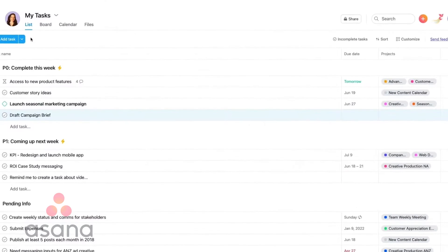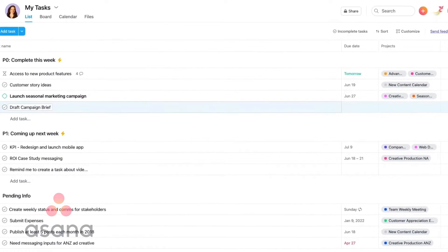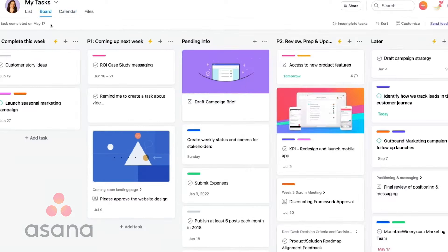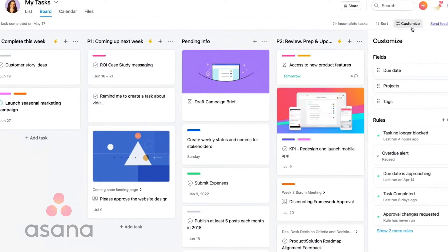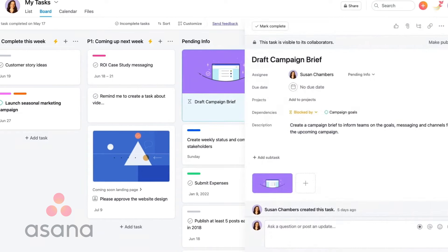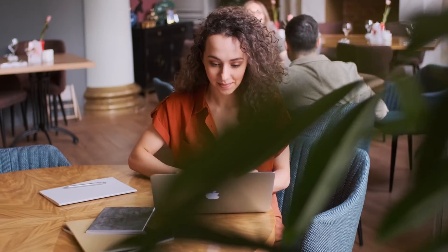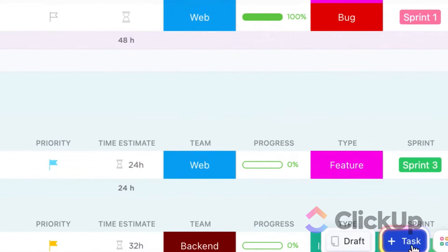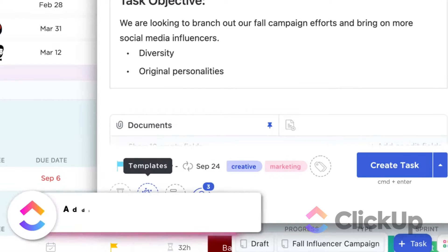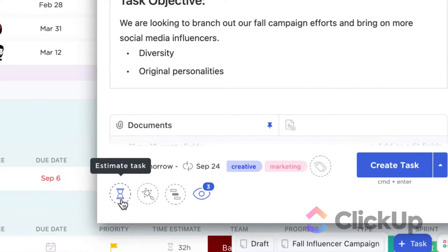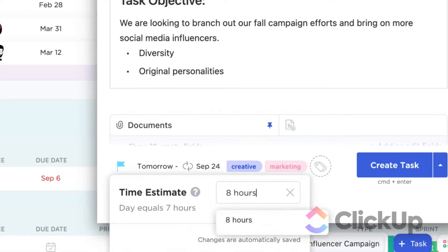It wouldn't make sense if we didn't start with project management when talking about PM software. First off, there's tasks. ClickUp and Asana can be connected to more than one project list, and you can add descriptions, due dates, persons in charge, etc. You can also indicate relationships like dependencies between tasks to ensure prerequisites are prepared accordingly. Each software also gives their users multiple options to view task lists, but ClickUp offers more options than its competitor. For example, Asana doesn't offer time tracking — you'll need an integration for that — while ClickUp lets you record work time by default.